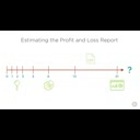If you ever encounter a feature that you feel is more complex than the 21-point tax deduction report, then you should feel free to throw the question mark card to prompt further discussion amongst the development team, or to look for a way to break it down into several smaller items.